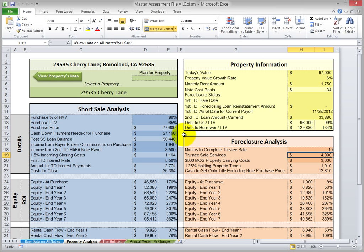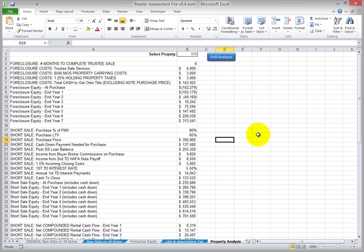We suggested spending no more than two hours developing a prototype. This would act as a starting point for idea generation and decision making moving forward. The prototype we delivered is very crude and minimal, but it provides more than enough content to help describe and discuss future developments — getting the project started rather than spending lots of time designing based on speculation. It gives the customer something to touch and feel.